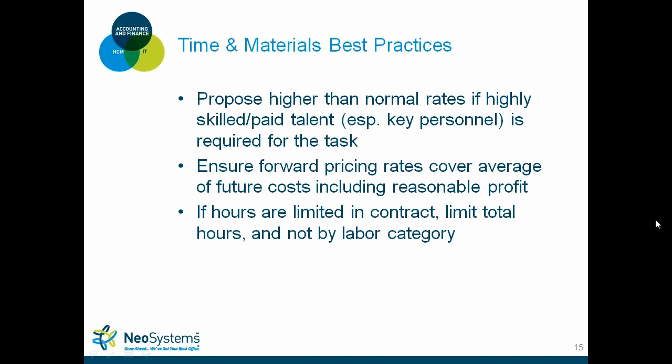We'll get into provisional rates later in the slide, but essentially you want to forecast out what your company's financials will look like within the year or the next year so that you can anticipate what that's going to cost the government, and then you're going to give them those provisional rates and build your labor rate off of those provisional rates.